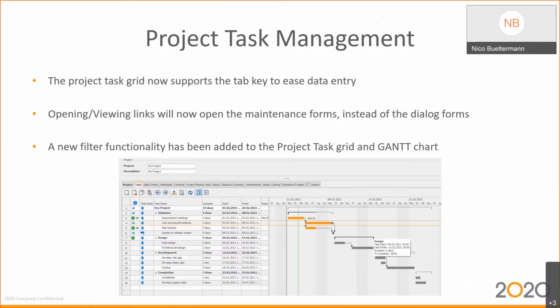And by doing so, it also allows you to auto-update your project plan and task statuses by using Insight's workflow system. So think of a scenario where when you confirm a sales order, the corresponding and linked task will then be automatically updated in its status or progress when, let's say, the sales order is confirmed and reaches a certain milestone in your sales order workflow.